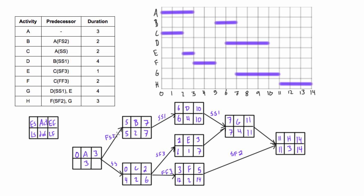Looking at activity C, we have two options again. The start-start relationship gives a potential late start of four, or we have a finish-to-start minus two from F - taking F's late start of three and subtracting two gives us three as the other potential late start for C. With the four, adding three gives seven; if we take three and add three, we get six. We have competing values for the late finish and must take the smaller one on the backward pass, so three wins. We put three in for C's late start, and three minus three is zero for the late finish of A. Ending on zero confirms we've done it correctly.